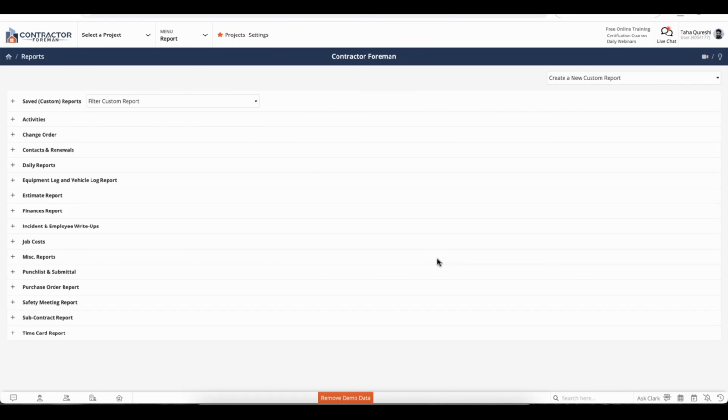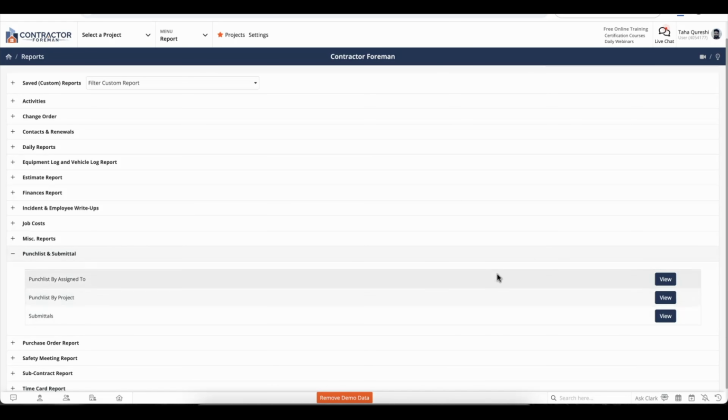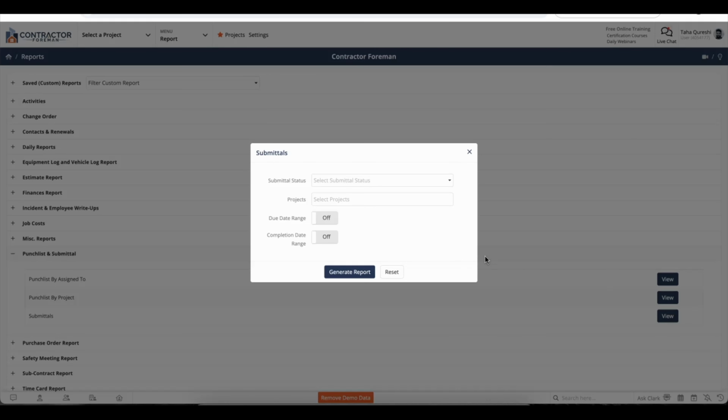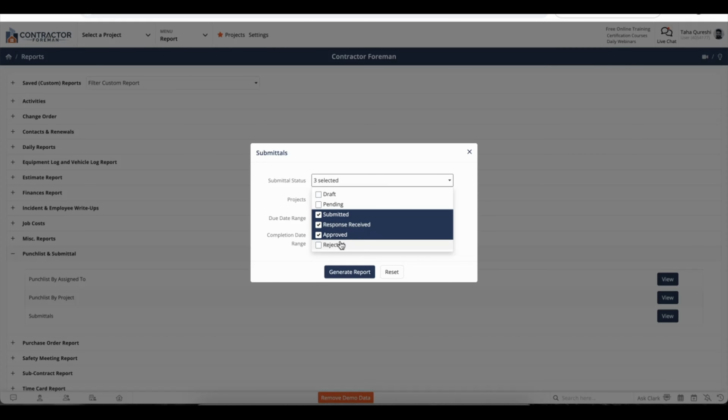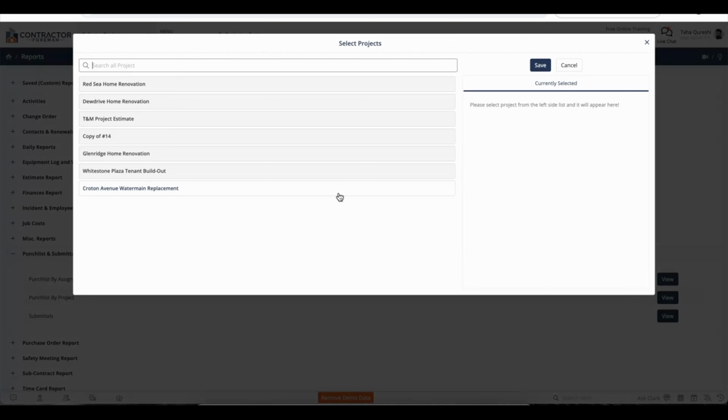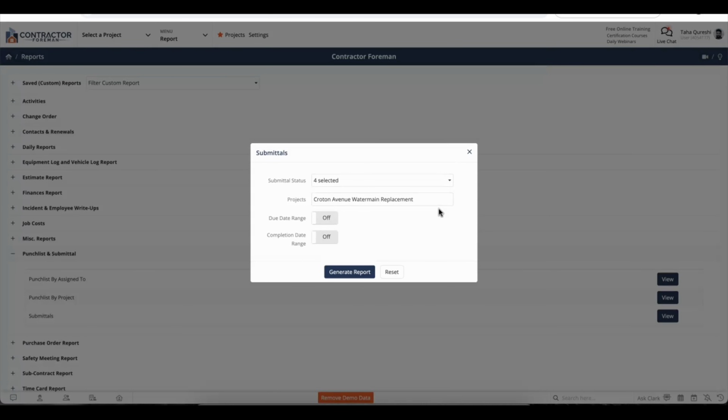In order to do that, for example, I'll go ahead and go to Punch List and Submittal, and beside submittals, I'll click on View. Let's say I want to review all the submittals which were responded to for a specific project, so I know what all the responses were from the customer or the consultant. So for example, I'll go to submittal status and click on submitted, response received, approved, and rejected. These are the statuses I want to follow up on, and the project that I'm looking for is the Croton Avenue water main replacement project.